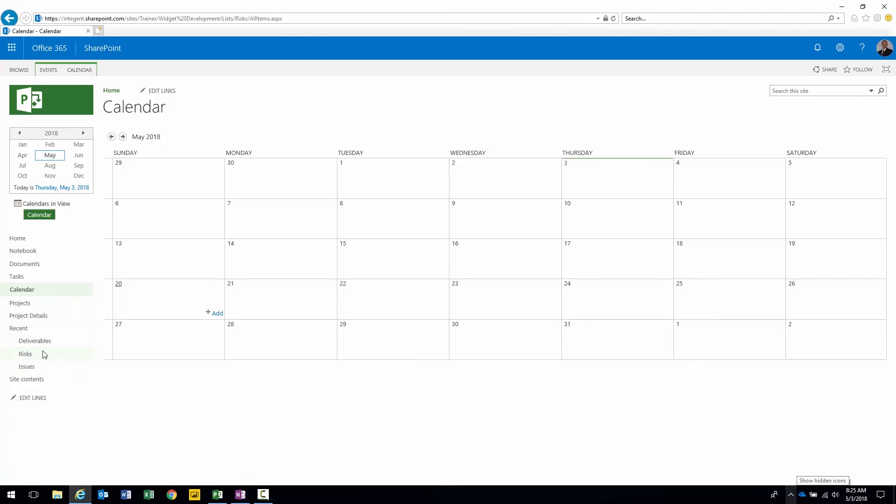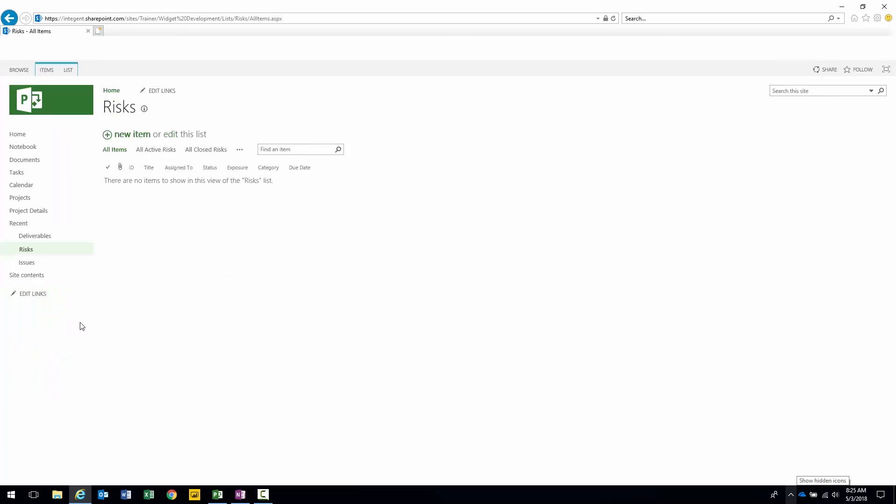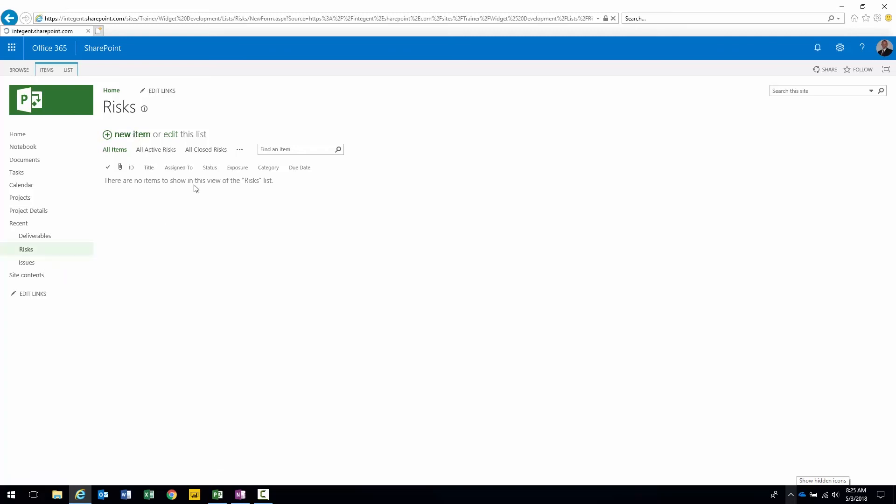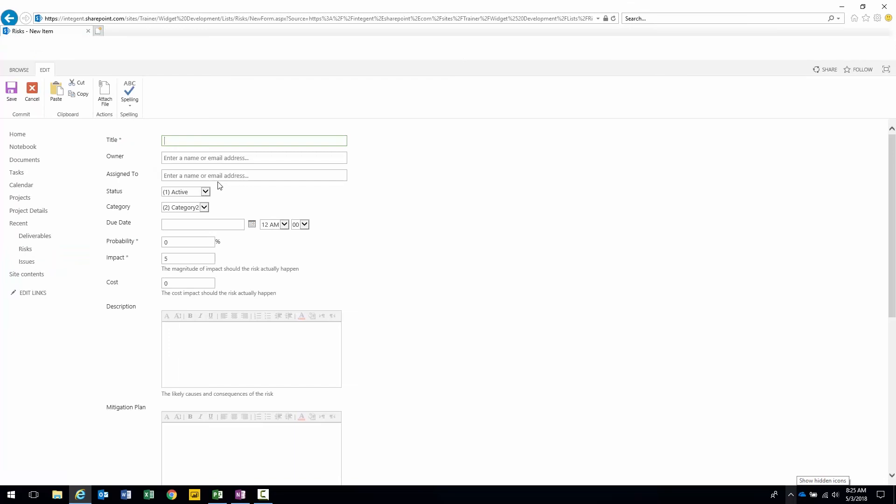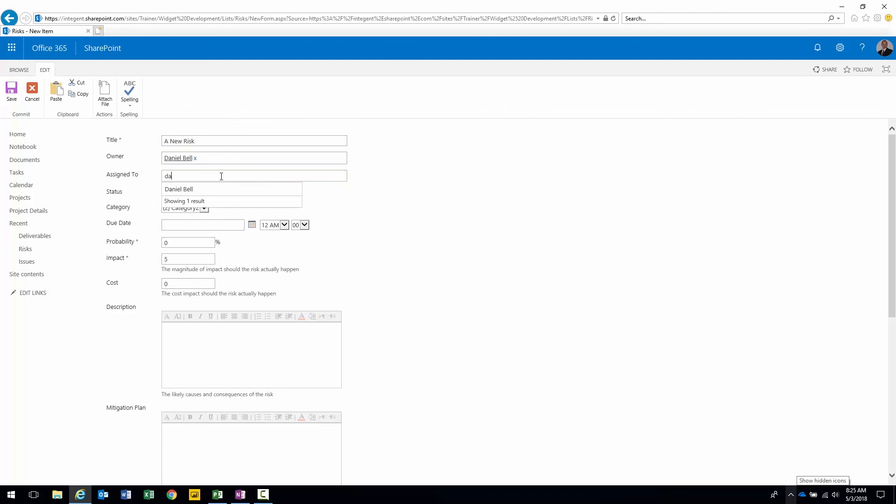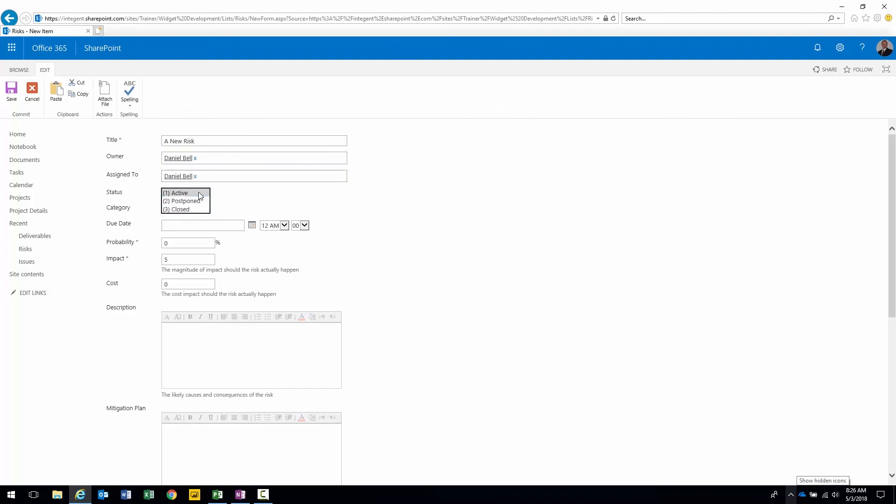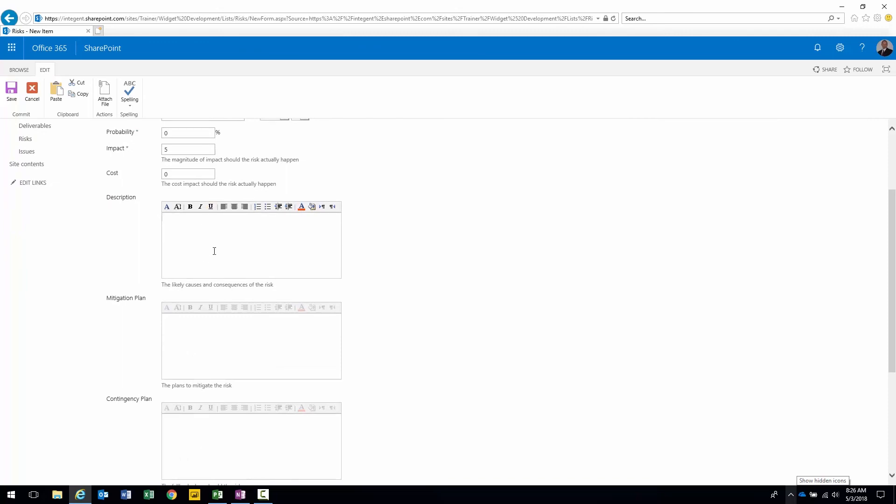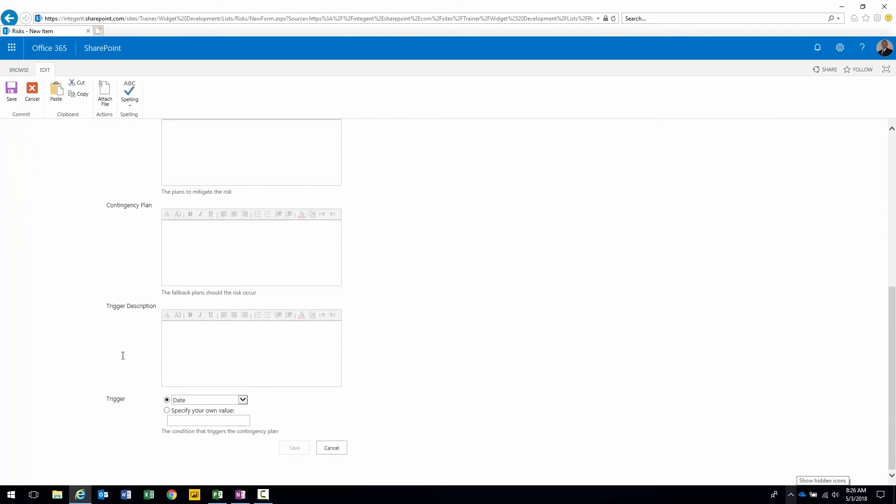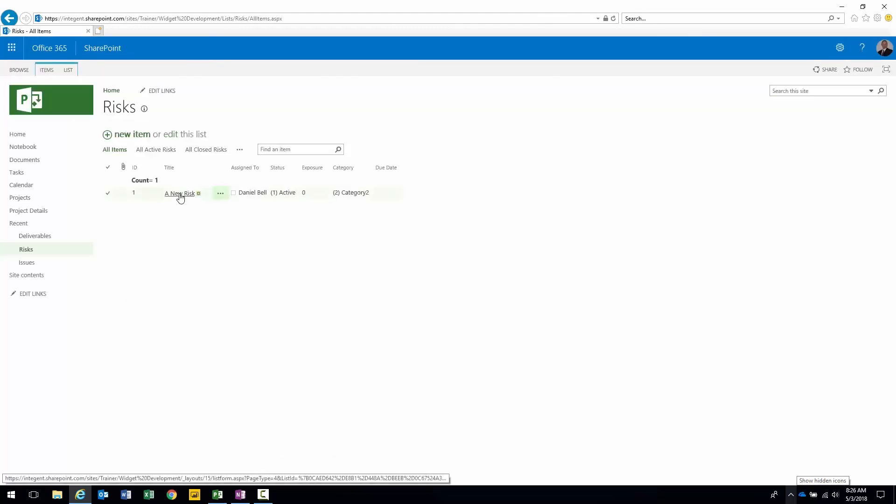Just more items that the project manager can use to keep track of the project. Risks is something that has the potential to affect our project. Issue something that's currently affecting our project. Creating one, just click on new item. Just give it a name. You can go ahead and start typing in the first name of the individual you're going to assign. Some of the fields have pick list values already here. You can update these if you want. The thing that you will want to refrain from is actually changing the name or removing default fields because that will cause issues with your publishing process.